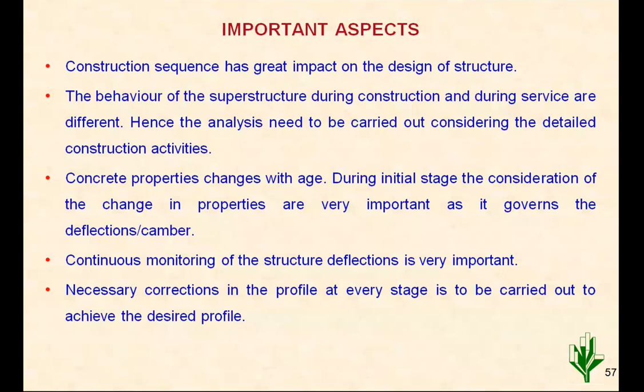But then continuous monitoring vis-a-vis comparison with the theoretical has to be done. Then necessary correction in the profile has to be done stage by stage. We cannot leave it and correct only at the end. So at each stage we have to make the correction and go further if the difference between theoretical and actual value is more.